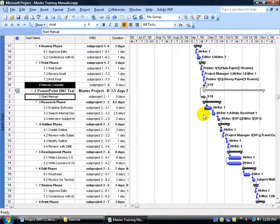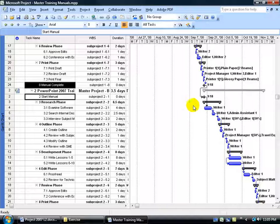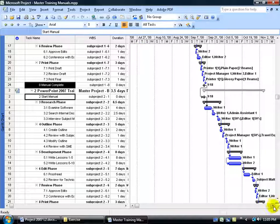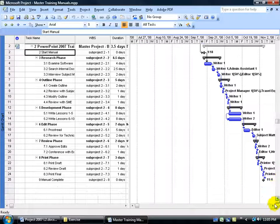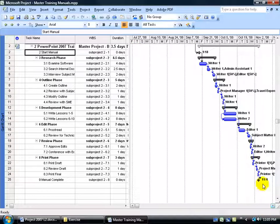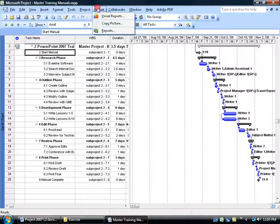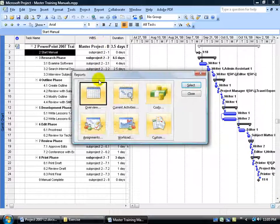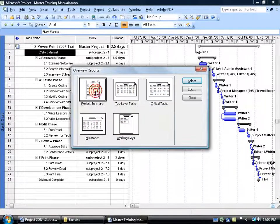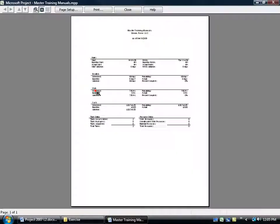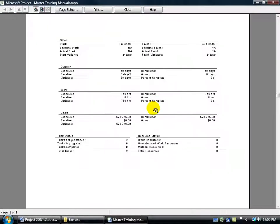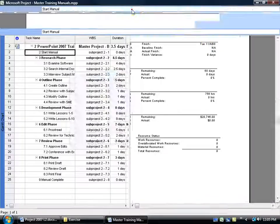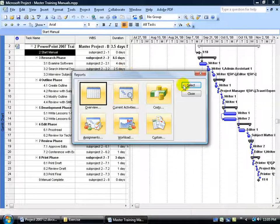Close out. Now let's look at the project summary report, because it should have ended on the 18th, but because it's going to be a project summary report of the master file, it should show us the end date of November the 4th. Again, report to reports. Overview, double click. Double click project summary. Click to zoom in. And there it is. It finishes November the 4th. Go ahead and close out.